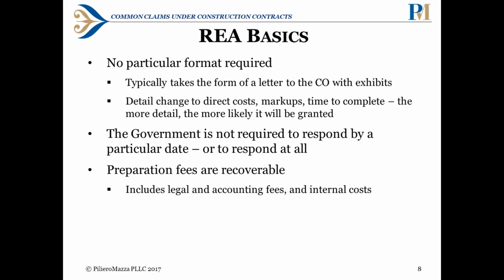There's no particular format required for an REA, but we typically will form the REA as a letter to the CO with exhibits attached which provide the support to prove that you're entitled to the time or compensation. It details the change, direct costs, markups, and the time to complete. You want to include as much detail as you can to support the REA to make it more likely that the CO will actually grant it. The government doesn't actually have to respond to the REA, which can be a reason that the REA might become a claim. And importantly, in an REA, preparation fees are recoverable because it's considered an aspect of contract administration and negotiation before there's actually a dispute between the parties.